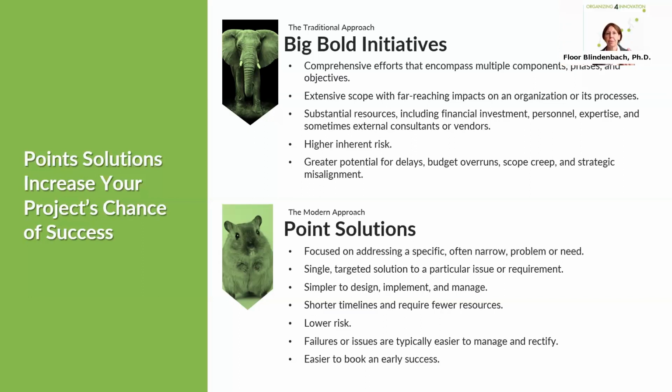Well, and also realize, like the previous committee, I was pleased that of the 7 people, 2 or 3 had lost interest, and we were working with 3 or 4, because early phase innovation project teams of 3 or 4 are perfect. 1 is too small. Anything between 2 and 5 helps you to keep a project moving. If you are beyond 5, it's a lot of talk, and it does not make the project faster, at least not in the initial phases. So with a small team, you can just tackle and make progress. And if you have 10, 15 people at the table, you're often spending so much time getting everyone aligned that you just don't get anywhere.